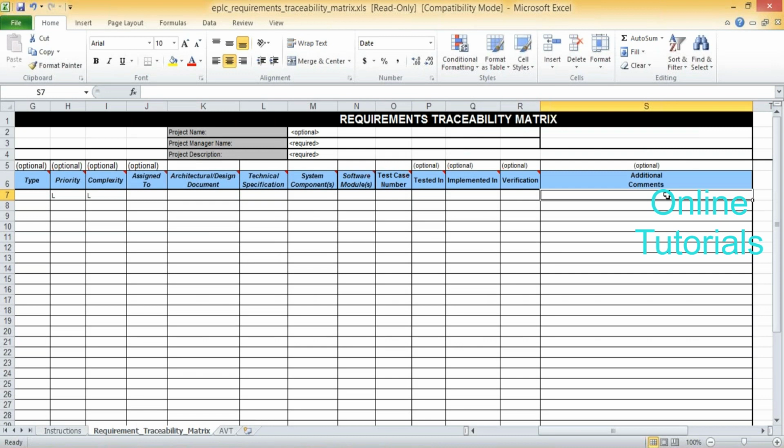Understand? So this requirements traceability matrix is in two forms. One is forward, the second we call backward. Forward doesn't mean from use cases to test cases, and backward doesn't mean test cases to use cases. In other words, we can call it from business requirements to technical requirements, and from technical requirements to business requirements. So those two should be equal.